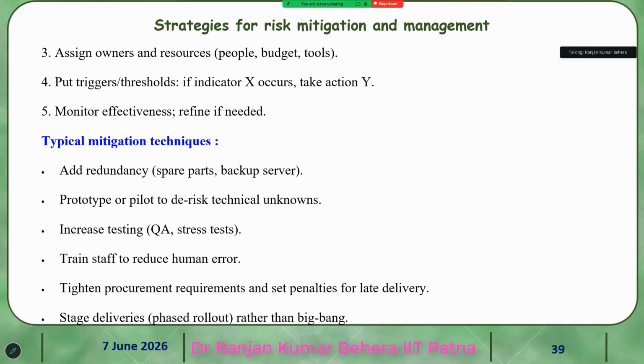So what are the typical mitigation techniques? Add redundancy, like spare parts, backup servers, etc. Prototype or pilot to de-risk technical unknowns.